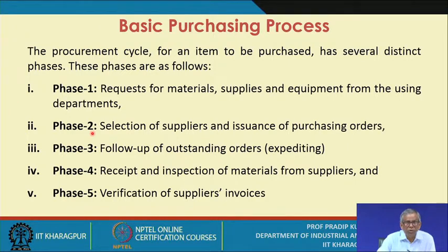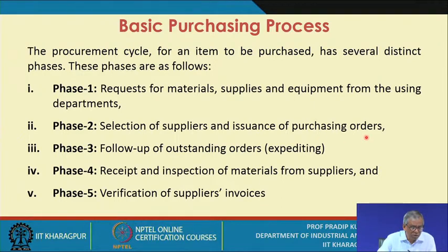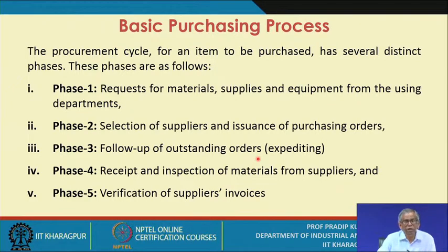Then we move to phase two. Here you need to select the suppliers, and once you select a supplier or group of suppliers for the given item, you need to issue the purchase orders. Phase two concerns the selection of suppliers and issuance of purchase orders. Once the purchase orders are issued, you move to phase three — the follow-up of outstanding orders, known as expediting. You must have a thorough idea about the different kinds of expediting norms and procedures to follow under different conditions.